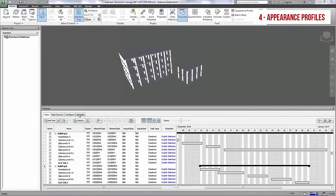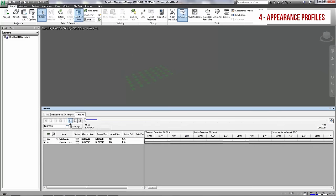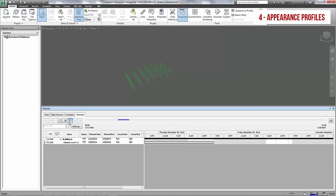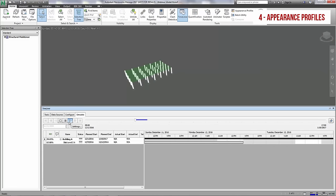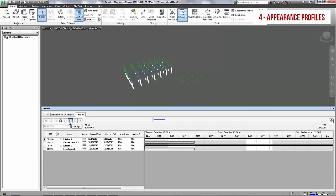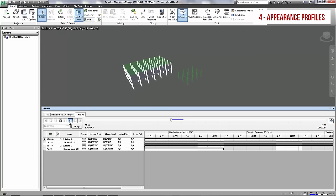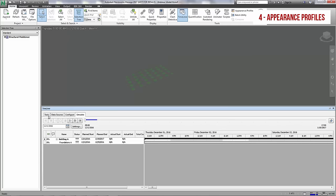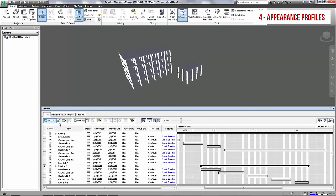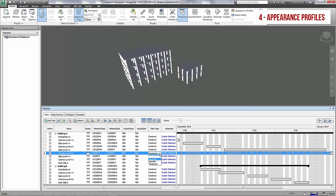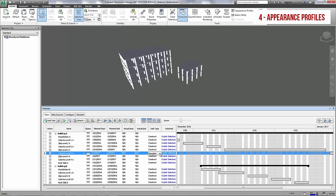Appearance profiles in Timeliner do not support growth simulations, which lessens the descriptive quality of the visualization, and only one profile can be used per task. This forces the users to create what is referred to as dummy activities or duplicates that will be lost after each synchronization and will have to be reworked.